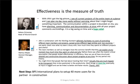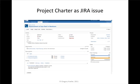So, let's see how the system looks. First of all, the project charter is a JIRA issue. So simple. It has a number, key, name. We can define goals and what the project is about in the description. We can also put people together with a responsible, a customer and a team field, and also stakeholders. It is project roles. Everything on one page, easy to see and find.